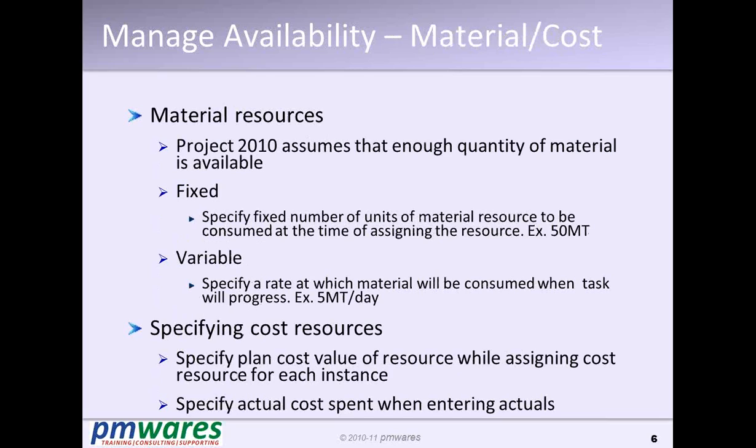Material resources: there is no inventory system in Microsoft Project. Microsoft Project assumes that you have enough inventory of all the material. What it tells you is about the cost of the material being consumed on a specific activity.